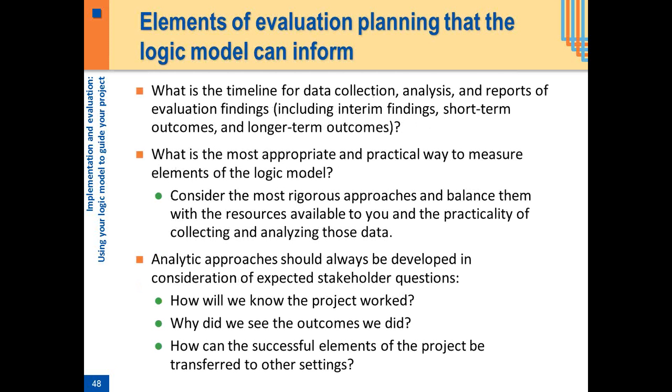Also, your logic model can inform the timeline for all of your evaluation activities. So again, your logic model depicts a pathway. A has to happen before B, which happens before C. So you're going to be able to get information on your inputs and your outputs and your activities, or implementation evaluation information. Then the next thing you'll get is your short-term outcomes, or information on how your risk and protective factors may have changed. And then finally, your long-term outcomes will be the next thing that your evaluator will be able to report on. So it's unreasonable to expect, let's say, outcome evaluation results on your long-term outcomes before you're able to see the earlier steps in your project evaluated.